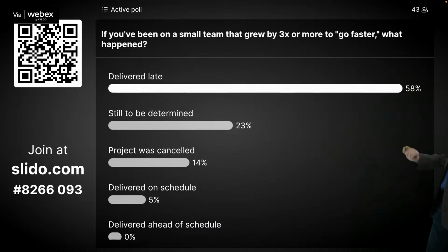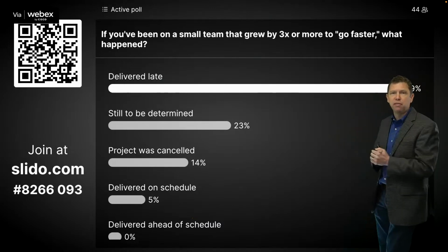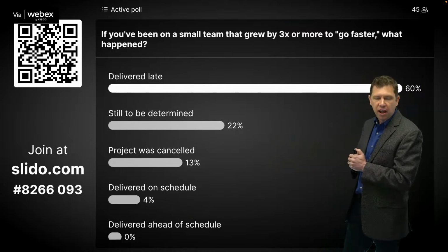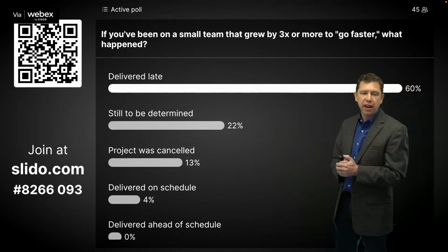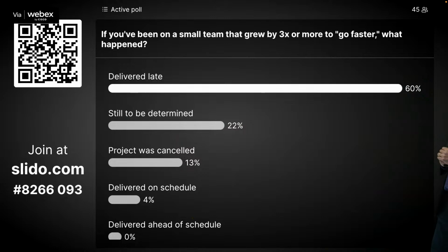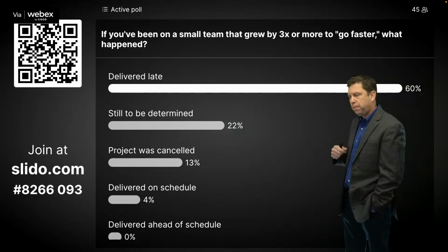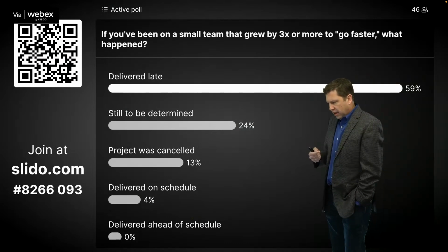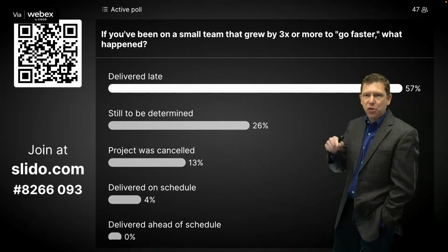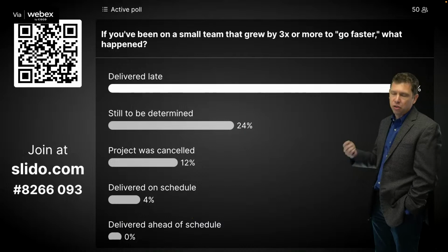Okay, let's see. So 58% said they delivered late. That's actually not the worst outcome, right? If you were able to deliver and deliver late, that may not have been that bad. Still to be determined. Project was canceled. Delivered on schedule, we got 4%. That's great. Delivered ahead of schedule. No one has actually had that happen. The idea of delivering late, one thing that's interesting is when you add 3 times more people to the project, in some cases, not only do you deliver late, but you deliver later than you were going to when you had the smaller team. And that's not unheard of and not even unusual.